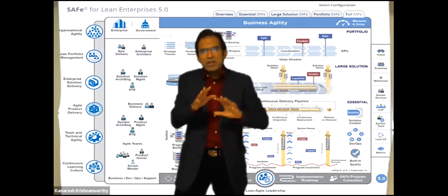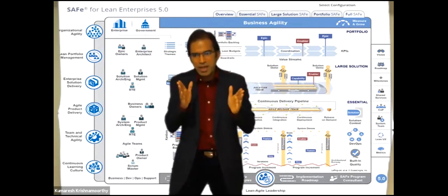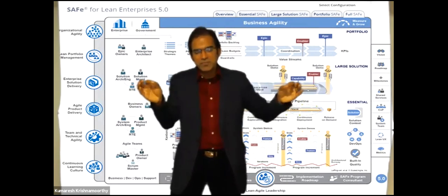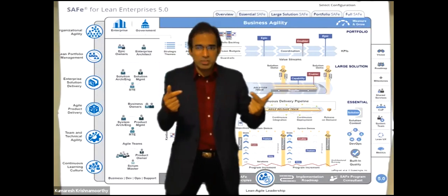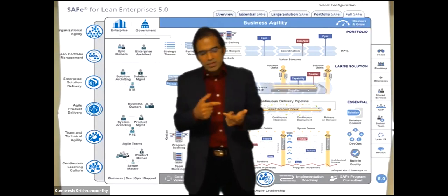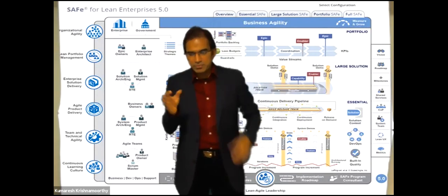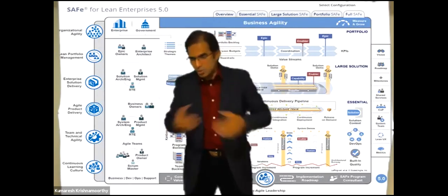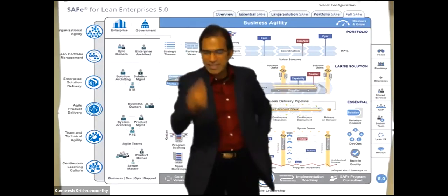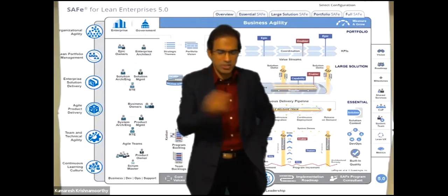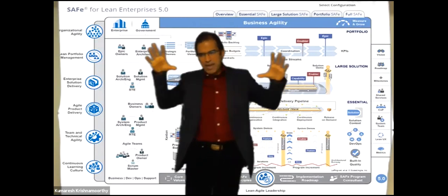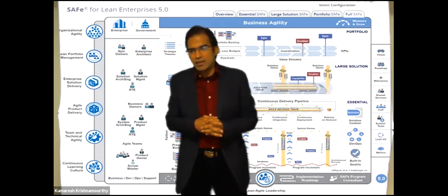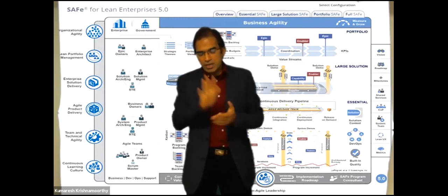But we need to at least have a high-level understanding of how these features depend on each other, support each other. So that is why a high-level dependency chart. And when you get into PI planning, of course, you need to build upon those dependencies to come up with more detailed dependencies between the stories and the features and all those things. So through the program backlog, through the program board, you can start building those things during PI planning. So this is the fifth input I always try to go with.